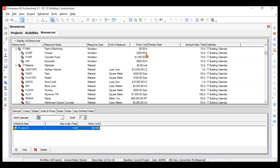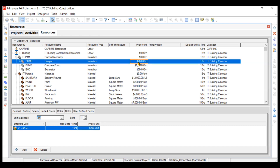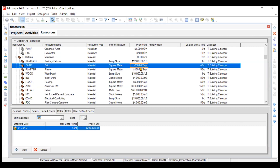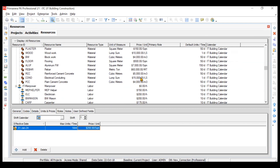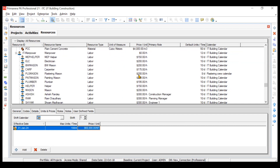They have their prices per unit. For example, the dumper — maybe on rent or internal hire charges — will take $200 per hour or something like that. You can also change the currencies. For the pump, it is $1,000 per hour. Similarly for material, the cost for paint is $200 per square meter, and for rebar it is $60,000 per metric ton.